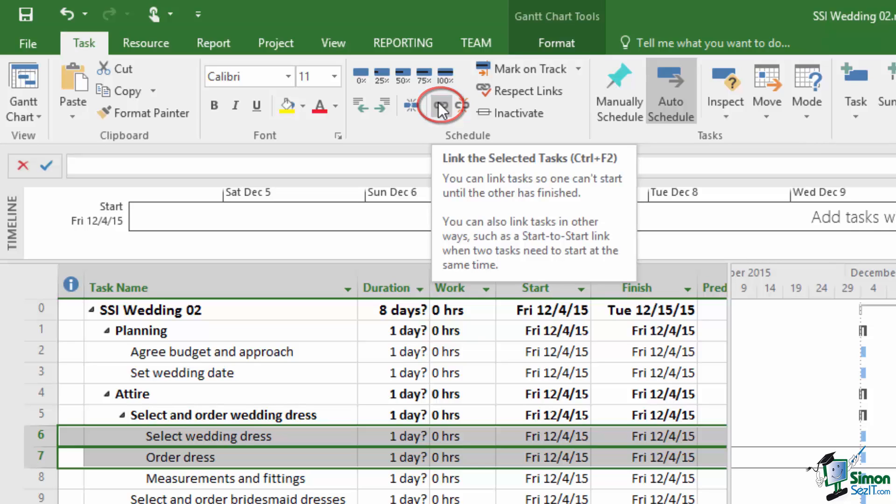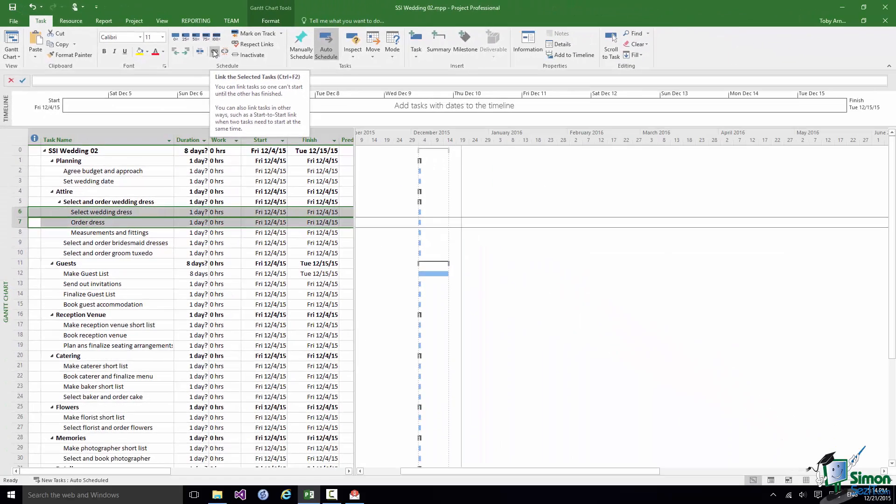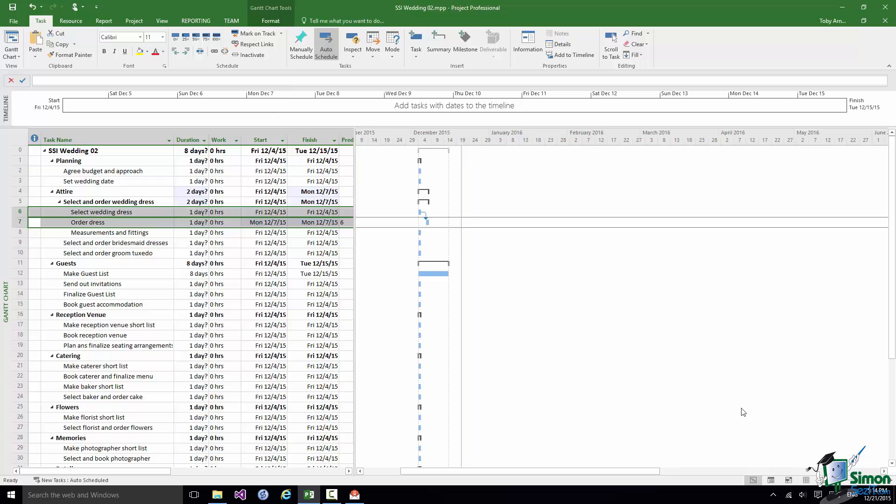You can link tasks so one can't start until the other has finished. And this establishes the very simplest kind of dependency.